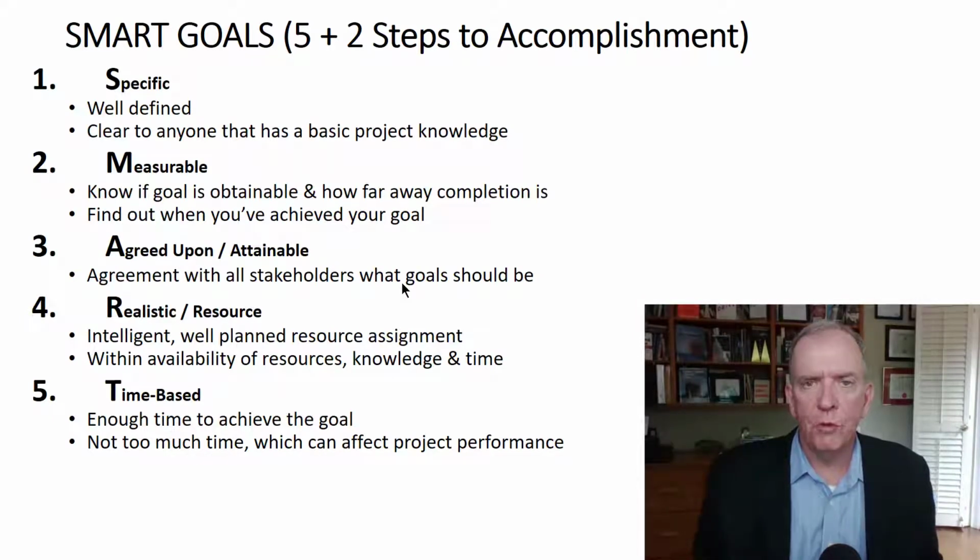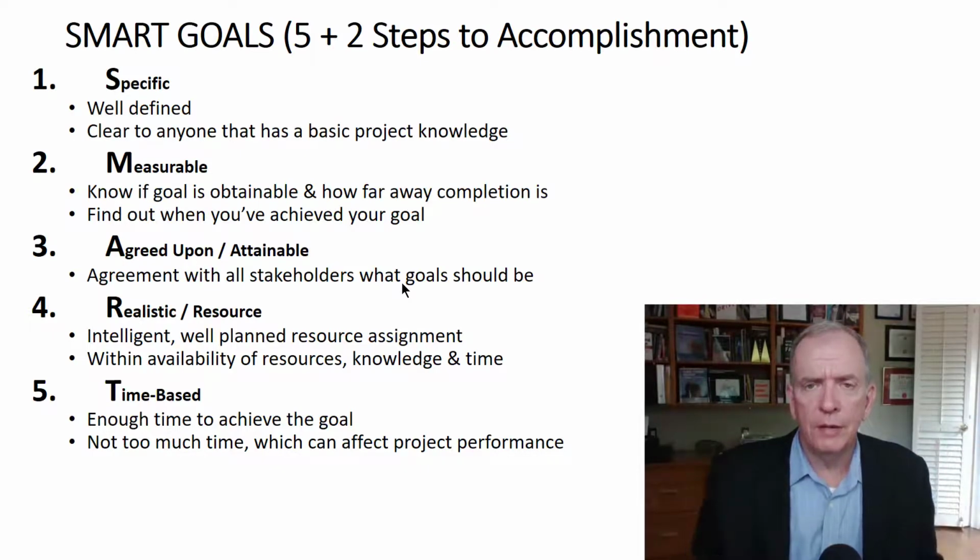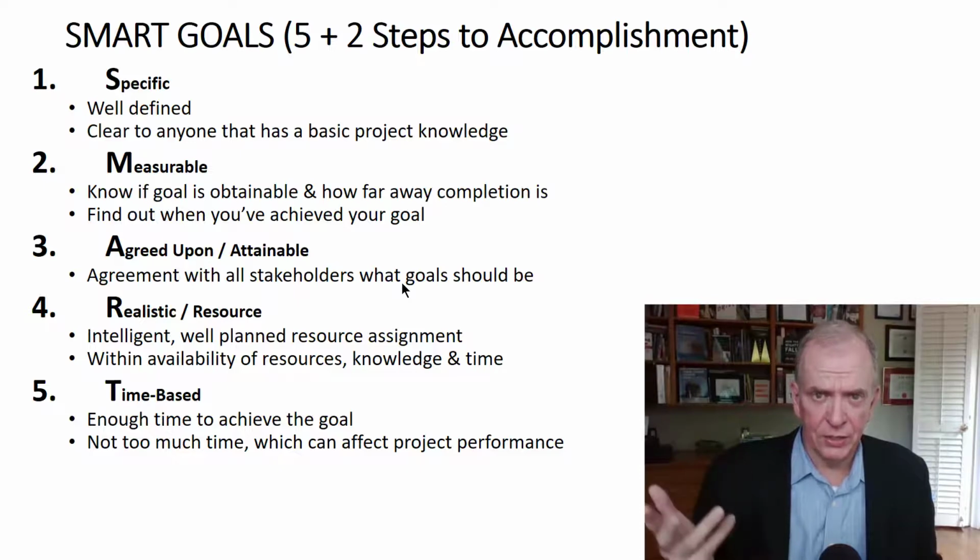And you can imagine if you have a whole bunch of different players on your project thinking that way, your project is going to be way, way overdue, and it's going to be way, way over budget. So you need to build that sense of urgency in there. You also need to make it not too much time. Even if you put a time frame, you've got to make sure it's not buffered too much, because if people know that they've got 3 weeks to do a 2-week task, they kind of take longer, or they don't send enough resources till the last minute, and then something else happens and it actually delays the project.